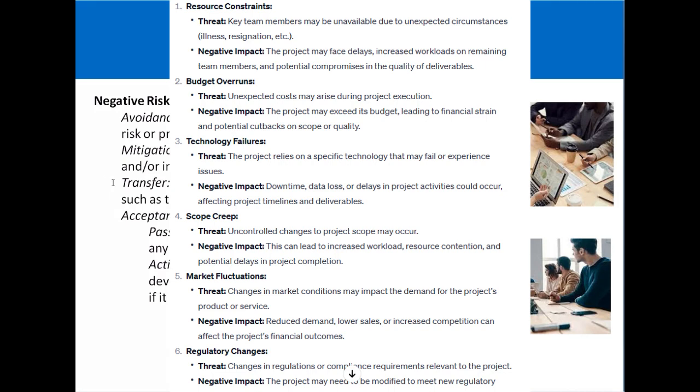Transfer means shift the impact of risk to any third party, such as through insurance or outsourcing. This is an example of transfer. Obviously if you involve insurance or outsourcing, the third party will be responsible for the risk.